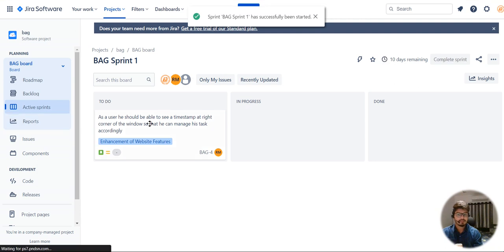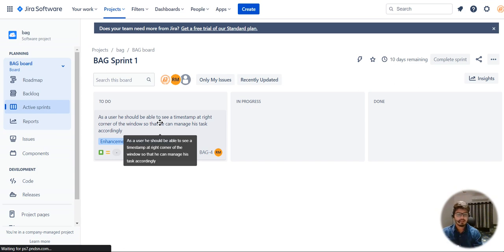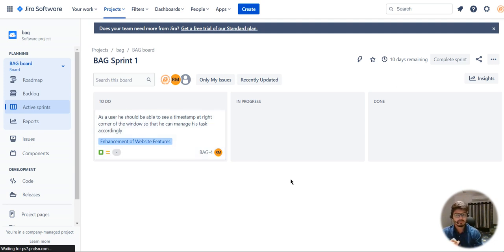Under active sprint you will be able to see that particular story is ready for the developers to work on. Anything you create goes to backlog first, and then you need to assign that particular story to a particular sprint and then it appears on the board. This is how you create a simple story on a Jira board. I will be coming up with more detail on how to create a board in Jira and how to set up a sprint.